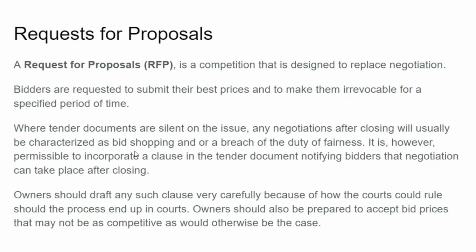Where tender documents are silent on the issue, any negotiation after closing will usually be characterized as bid shopping. This is a problem that a lot of companies run into. You bid on a tender, for example, and then you win the tender. Then the organization that accepts your tender says, well, I want you to do a better deal on that. You're not allowed to do that. Once the tender is accepted, it's accepted. If there are other things that the company wants you to do while you're doing the project, they've got to pay extra for them. That's where you make money on tenders, usually in changes that are taking place.